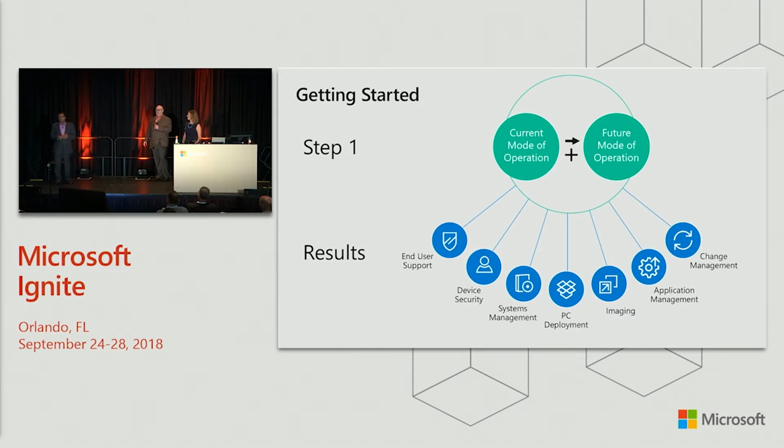Thank you. And finally, change management. Again, they have a very agile process for change management. The change control board meets once every week. If it's a fairly simple request, it gets approved without a change control board intervention. Otherwise, you take about a week to approve it. Yeah, it depends on what the change is and what the complexity is and which platform owners are involved. So it's pretty complex. Thanks, Scott.